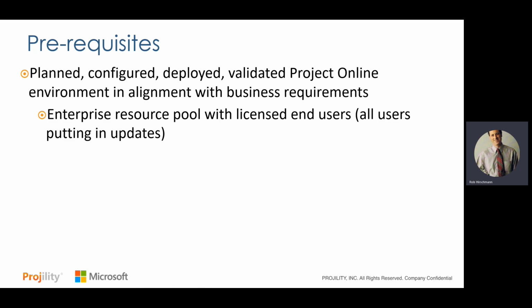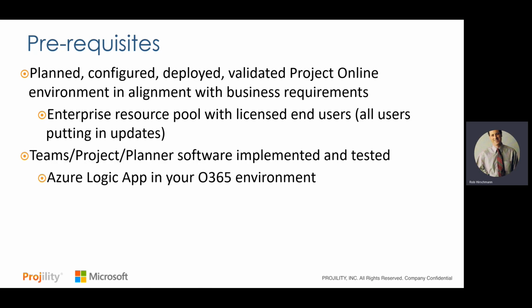You will also in Project Online need to have the enterprise resource pool set up with licensed users. So everybody who's using the solution will actually need to be a licensed user, just like they would in Project Online. You're just extending that functionality out to be used in Teams. So all users putting in any kind of update or viewing information need a license. Then the integration component of the Teams Project Planner solution gets implemented and tested in your environment.